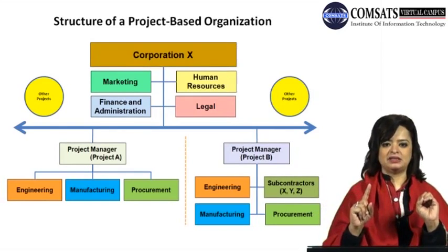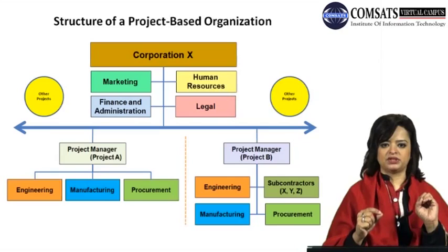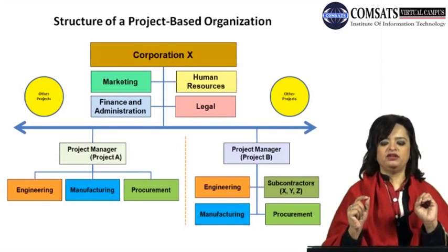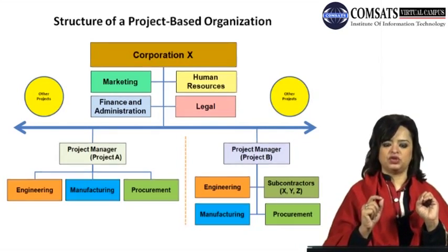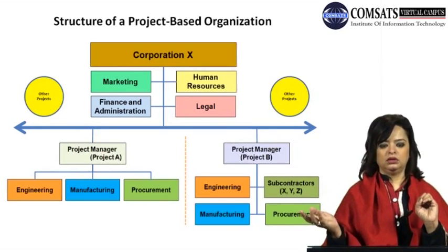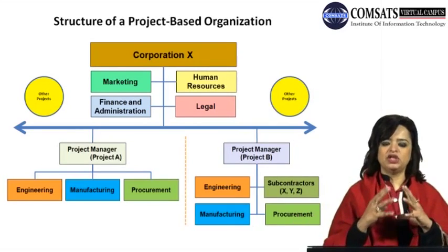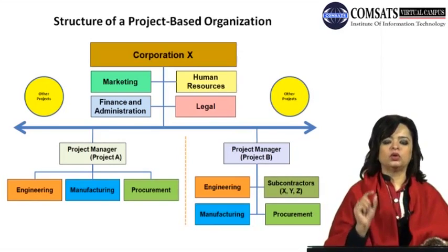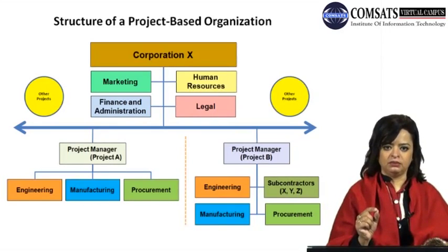project manager understands that based on the estimates, 20 hours in a week was sufficient for the procurement person to take care of the procurement activities. And so by Friday 4 p.m., he or she will not have an excuse of not having time or being occupied on something else. So if the estimation process was correct, that work will be done by Friday 4 p.m. by that procurement person.